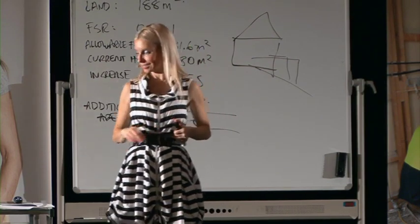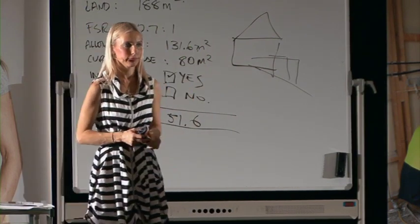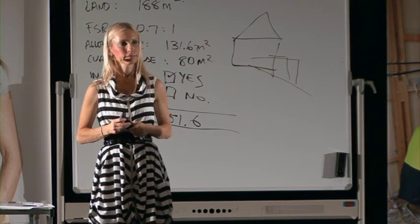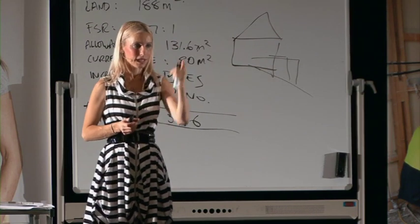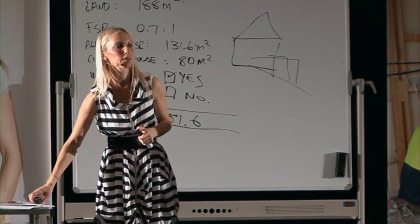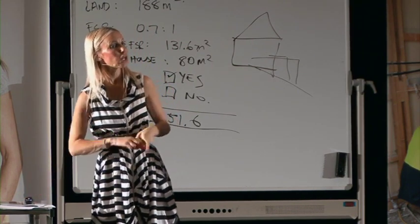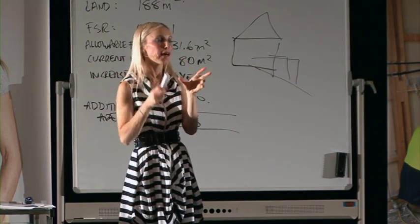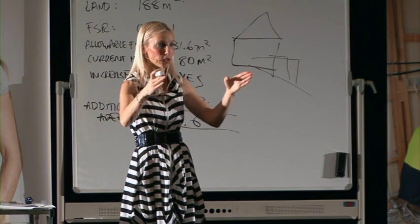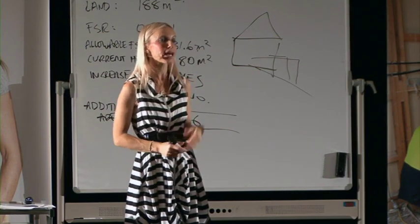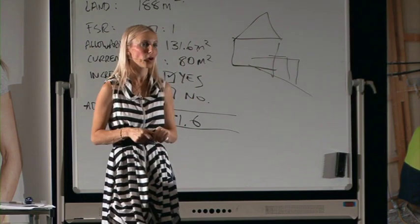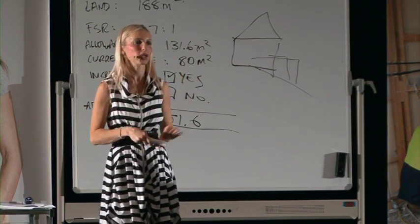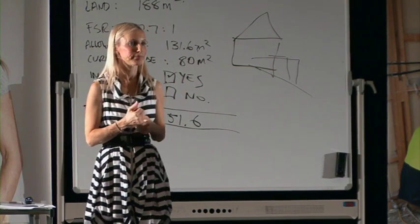Question: with a 70 square metre backyard and you want to add 50 square metres, would council require a second storey? Yes, it has to comply. That's the challenge for your architect — they know you can get an extra 50 square metres, and they solve how it complies with height, setbacks, and landscaping ratio, including hard stand. That's what you're paying your architect to do.